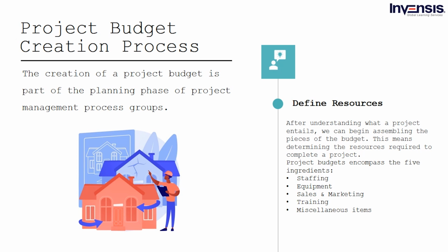Make a list of all the personnel and materials you'll need to do the job on time. Then align the project's resource requirements with what you already have on hand. If there is a hole, it reflects the breadth of things that will necessitate more spending. From there, the determination of the budget can be done.